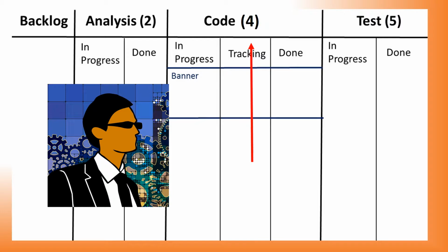Also, the testing step never comes close to seeing 5 tasks at once. It generally only has 1 or 2. This means that the limit for the testing step is set way too high. We'll bring that down to 2. If that causes a bottleneck because of the increased coding rate, we can always increase it.